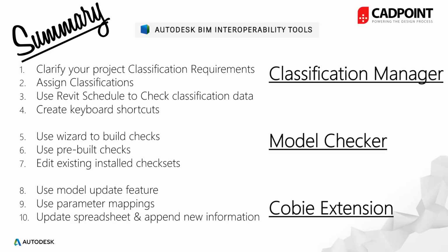Has the client specified a classification system on the project? In a lot of cases on BIM level 2 projects, the client's or your employer's information requirements will have specified some classification system. So it will depend on the project, and it should have been specified somewhere. If you're working to the ISO 19650 using the UK annex, you are required to use a classification system, yes. Okay, you are required.